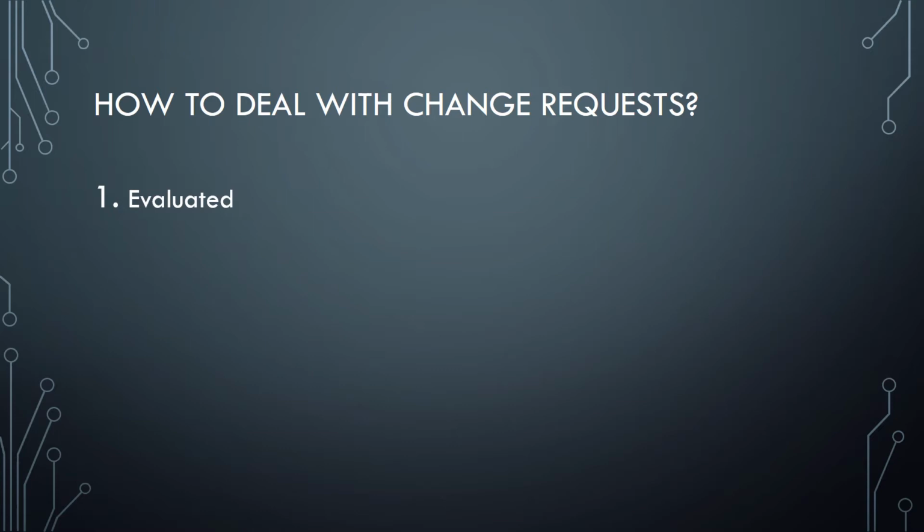So let's say you receive a change request. You are going to evaluate that change request. You are going to understand what this change request impacts. Does it impact the schedule of the project? Does it impact the cost of the project? Is this a change related to resources, right? Let's say a resource is going out on an unplanned vacation, an unplanned leave for 2 weeks. How do you tackle that change, right? So the first thing that you need to do is to evaluate the change request that you receive. How is that change going to impact your project, right? So that is the first thing that you do when you encounter a change request in your project.